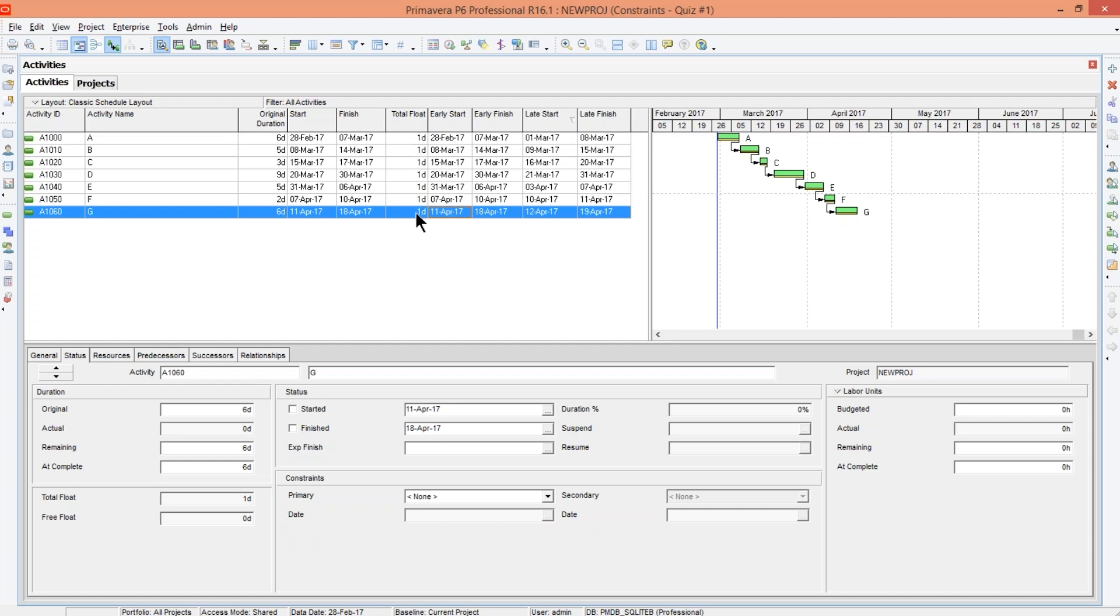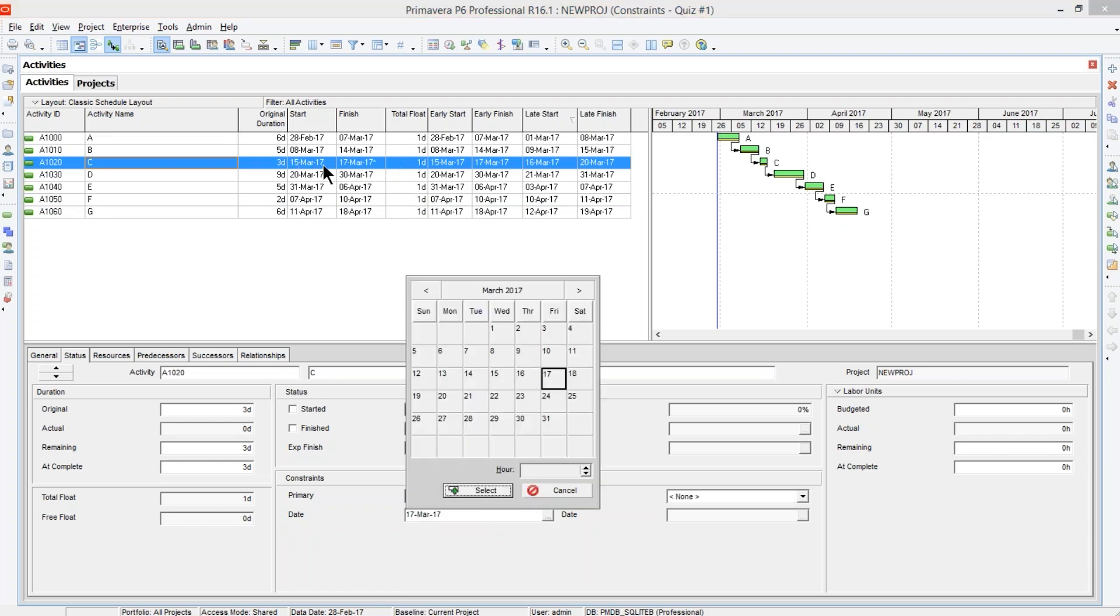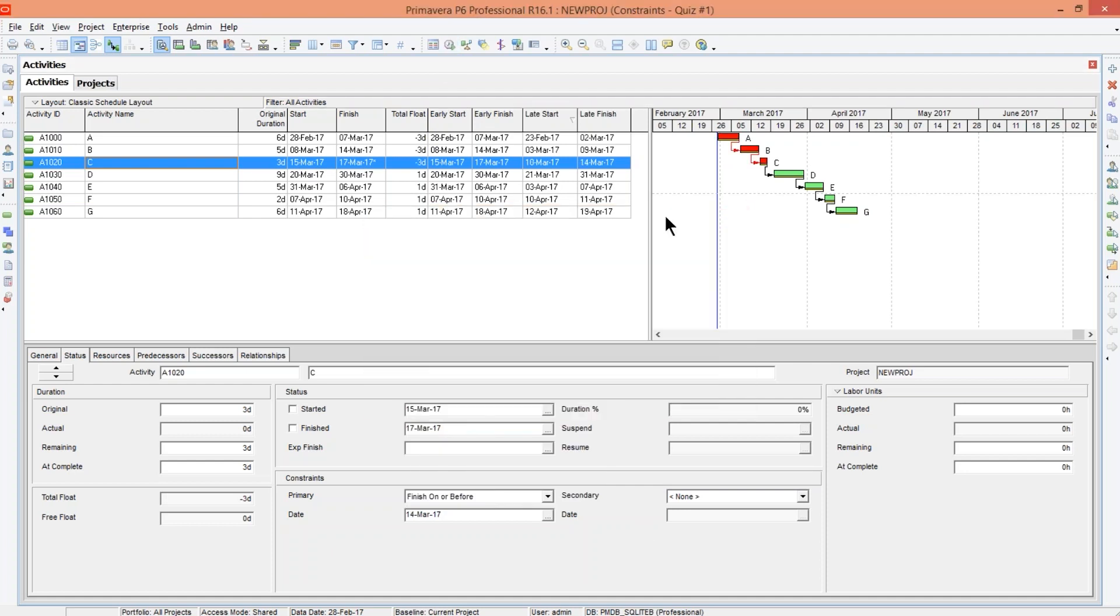And if you look at total float column here, we have one day of total float on this path of activities. So one day, and what we've done here is we've come to C, and we've said finish on or before, and we've set the date earlier than when it's currently finishing. So it's currently finishing on the 17th, and I'll probably bring it back a few days, like this. Essentially creating negative total float in activity C and its predecessors. So using a finish on or before constraint here applies, creates negative total float for that activity.